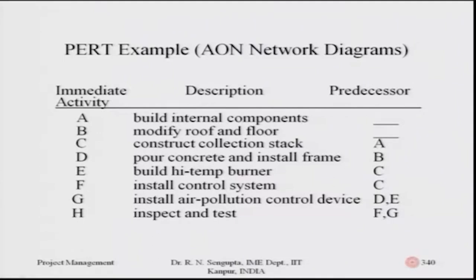Consider a PERT example based on an activity-on-node network diagram. The first column lists activities A through H with descriptions — essentially building a system: building internal components, modifying the floor and roof, then building air instruction structures, implementing a system for air pollution control. The second column gives predecessors: before C, A must come; before D, B must come; and before H, both F and G must come.